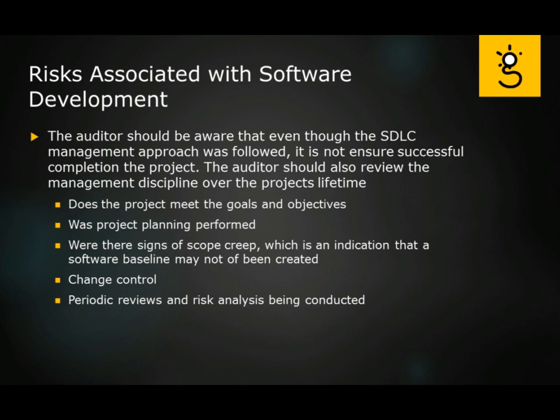Were there signs of scope creep, which is an indication that a software baseline might not have been created? Were there signs of change control put in there and planned for? Were there periodic reviews and risk analysis being conducted throughout the entire development lifecycle?